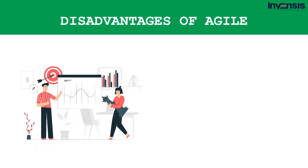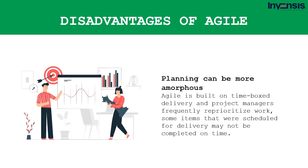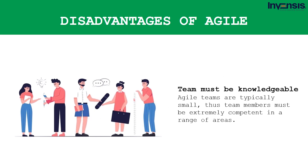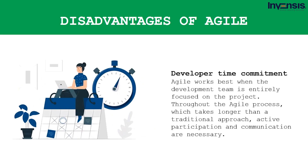Now let's look at the disadvantages of Agile. First, planning can be more amorphous — it's not always easy to nail down a firm delivery date. Because Agile is built on time-box delivery and project managers frequently reprioritize work, some items may not be completed on time, and additional sprints can lengthen the overall duration. Second, the team must be knowledgeable — Agile teams are typically small, so members must be extremely competent in a range of areas and comfortable with the adopted methodology. Third, developer time commitment is significant, as Agile works best when the development team is entirely focused on the project throughout the process.